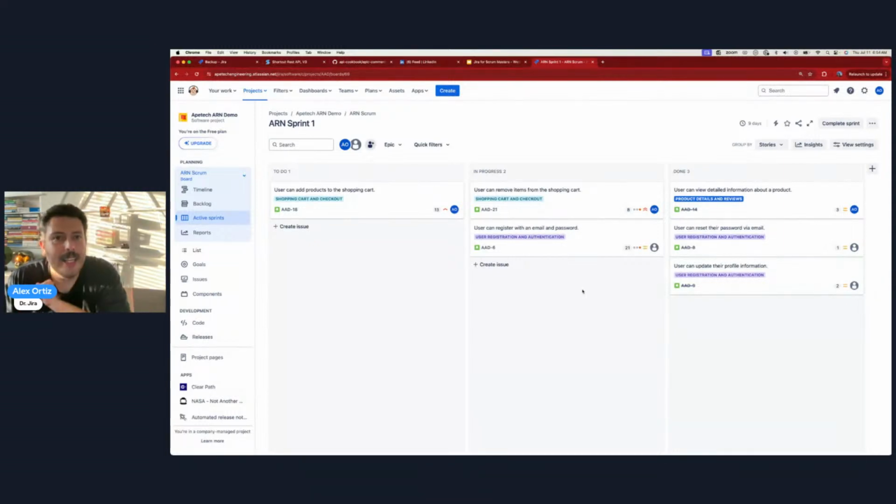And a couple of gotchas here, again, as a Scrum Master, what can you do here? Number one, Jira only gives you credit if you move something to the farthest right column. It doesn't have to be the done status, but it does need to be whatever status you have in the farthest right column. So when you move something there, Jira is going to go, good job, right? And reward you handsomely by giving you a burn down on your report. Anything that's to do or in progress will roll over to the next sprint, or you will have the option to move it to the top of your backlog, right?